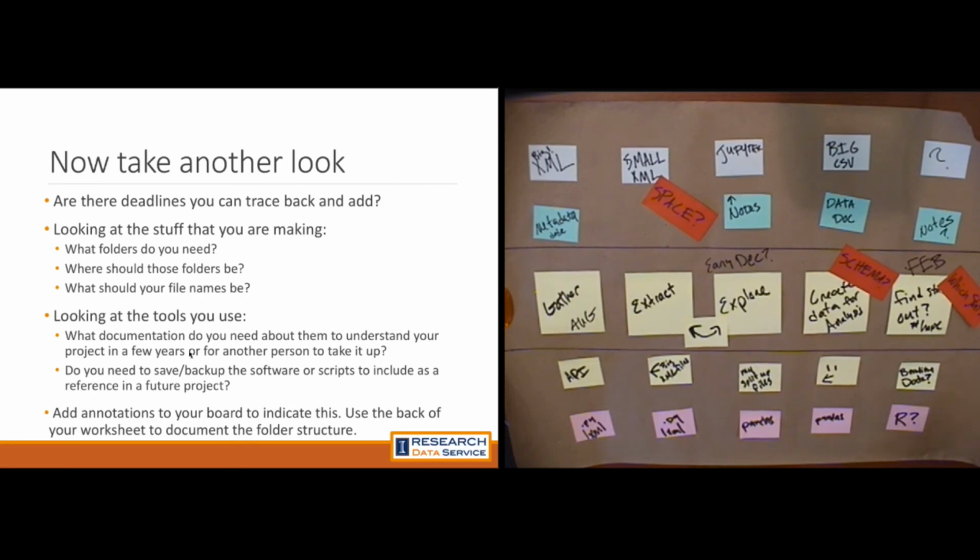But of course, annotate this however you want. So in the smaller version that I run, we only do the center point, or we only work on the activities, and then on each one of these activity Post-it notes, we jot down the name of the data that you're working with, and who's going to do it and when it's due. And that's something that can be done really quickly. Yeah, so that's actually all that I have.